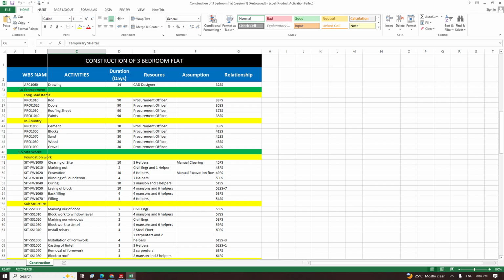If you want to excavate the soil below, let's say, 150 millimeters or up to less than 1 meter, 600 mm, you need a dewatering machine, else water will not allow you to do that excavation because it's a riverine area. Water is coming up from the ground. So any small thing you open, you start seeing water. So what we do is install a dewatering machine that will pull out the water and make the environment dry for you to work. So all these things are equipment, so you must plan for them.